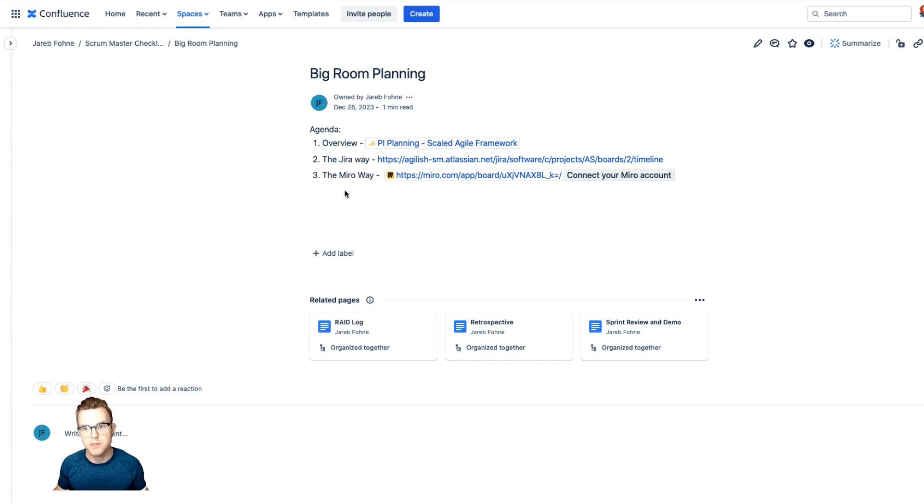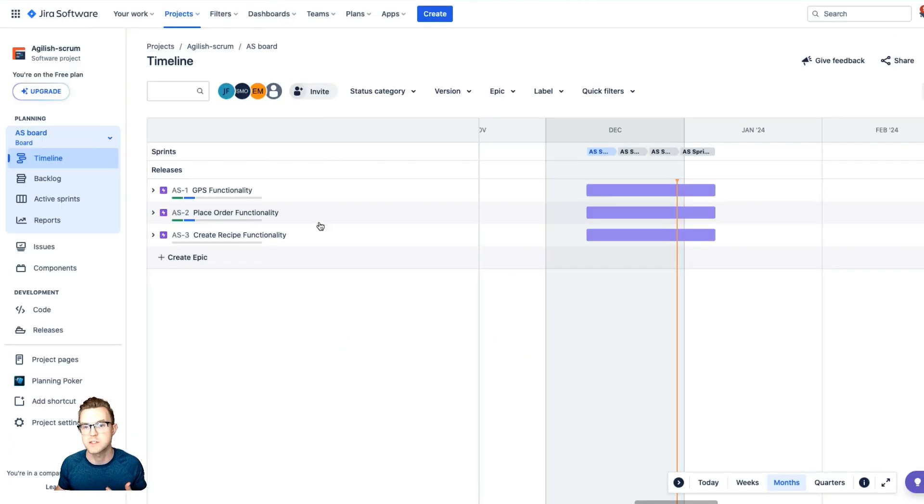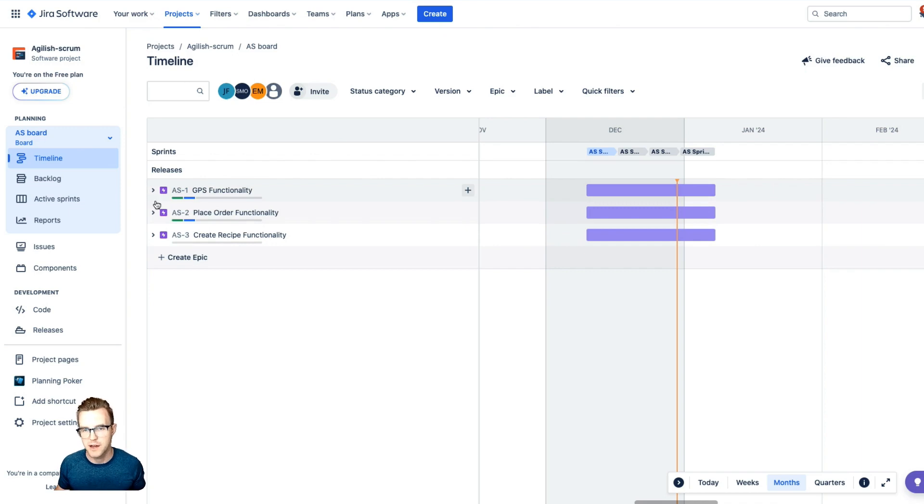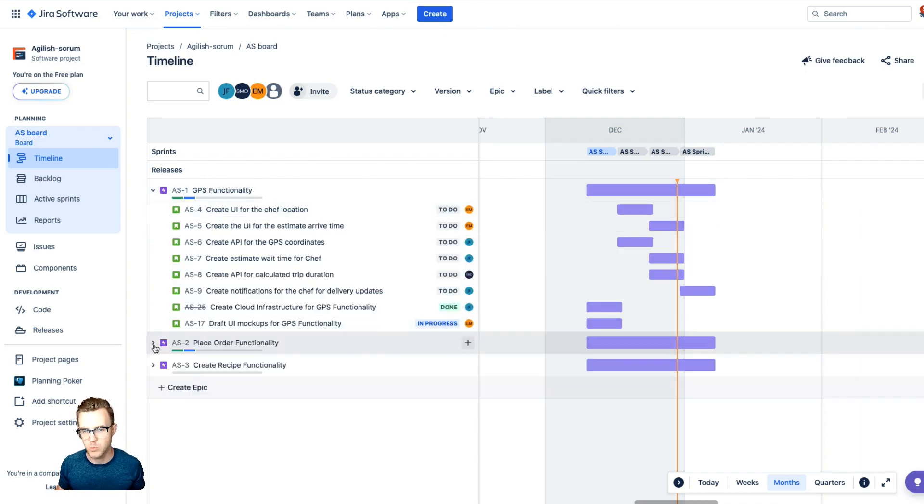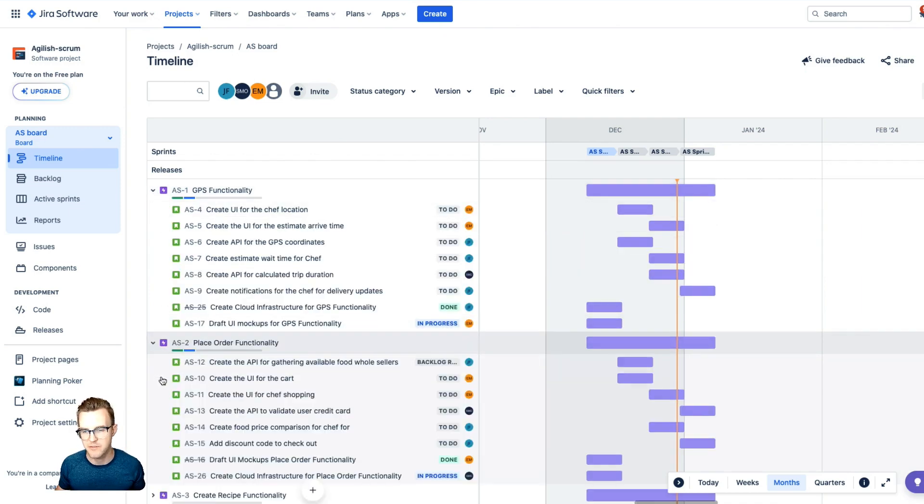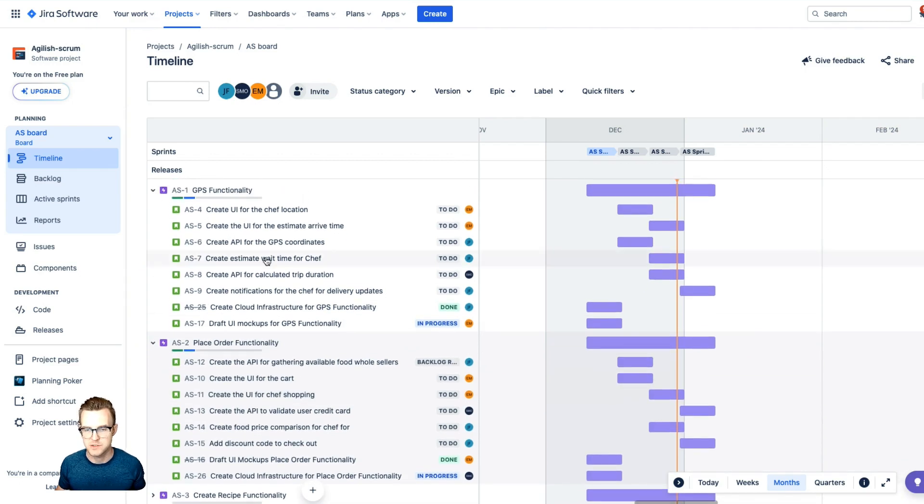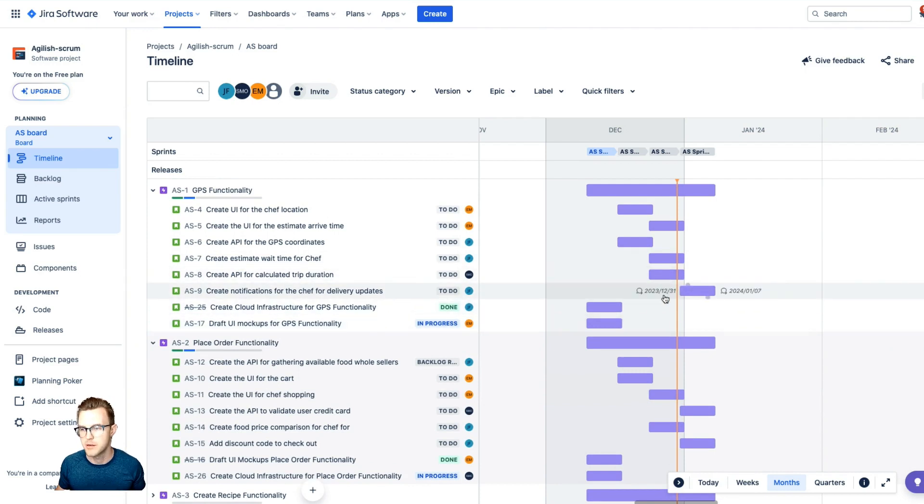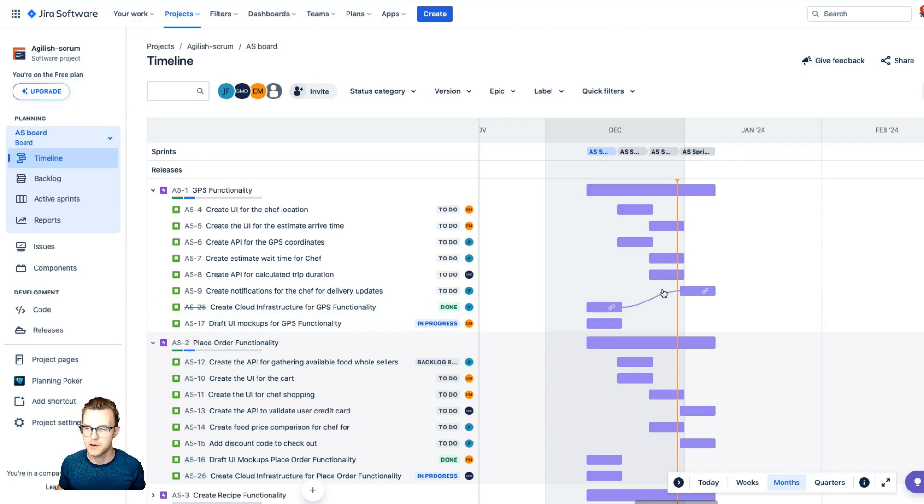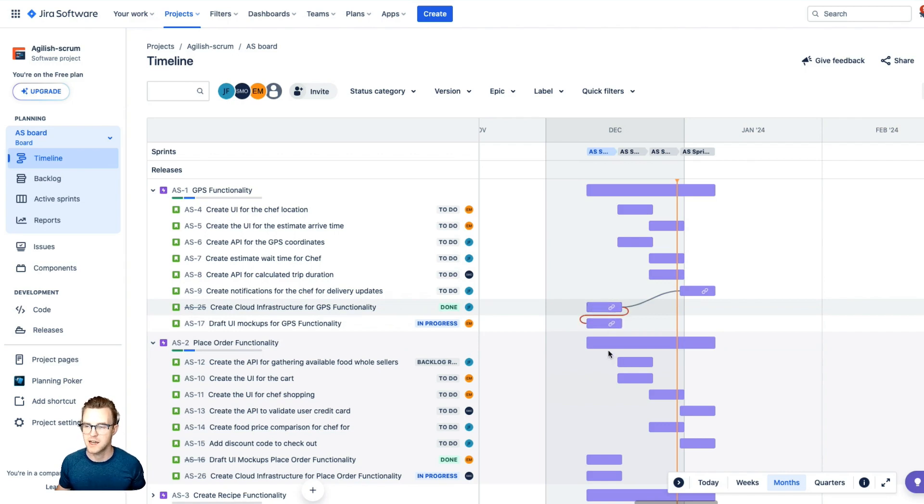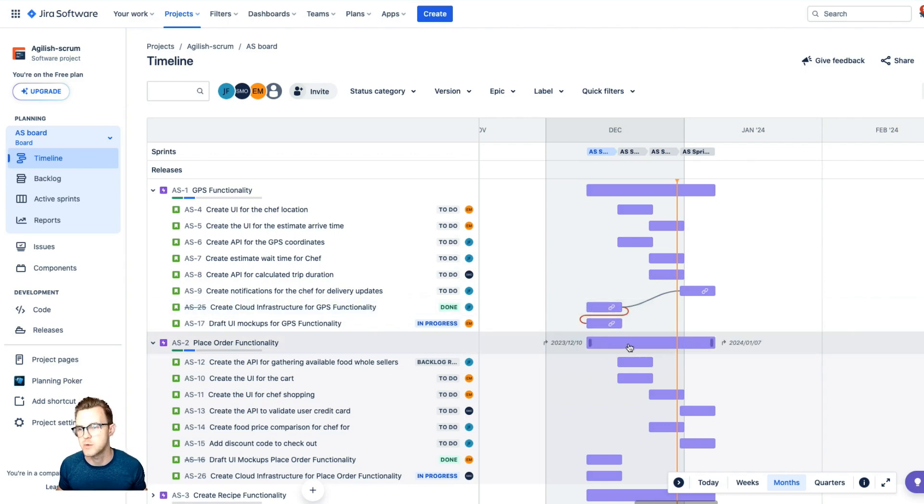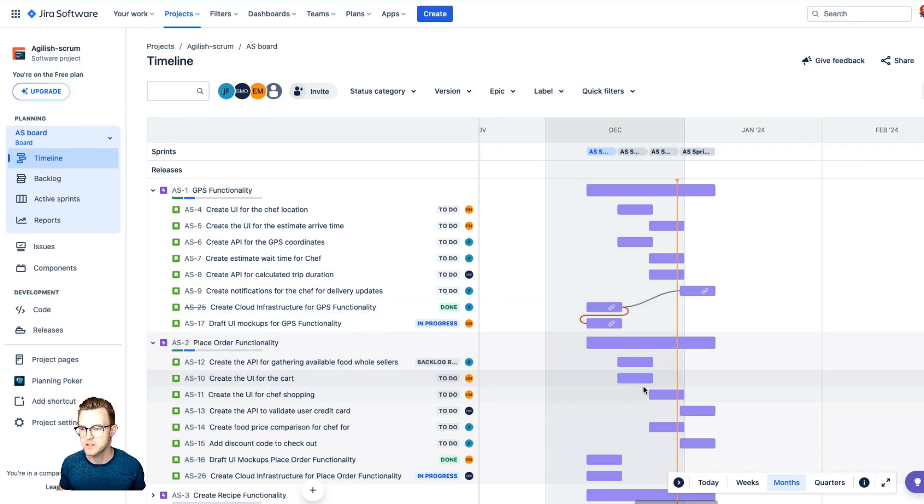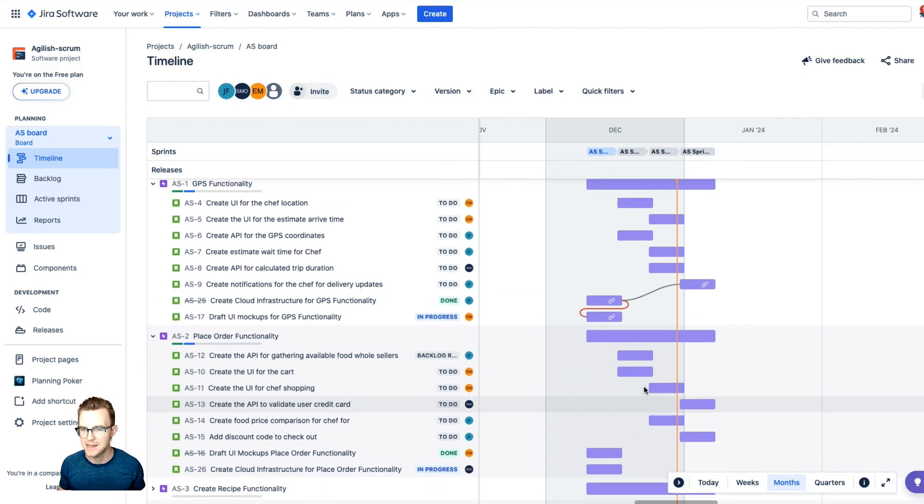So the first way I would say to do this is you can use a Jira feature that's already here, which is this timeline feature. And so here, you can have high level groups of work that you can align on that vision. You can create those pieces of work and you can plan it into a roadmap. So this is the first way. And also with this in mind, there might be ways you can actually attach it to dependencies. Remember that item we're talking about, see dependencies. You can actually track that here. It's the same kind of version as that one visualization board we showed. See, there's a red dependency here because it's in the same sprint, same time box. So that might be something we need to take a look at. But really the idea here is you can look between the teams' work and plan it together.